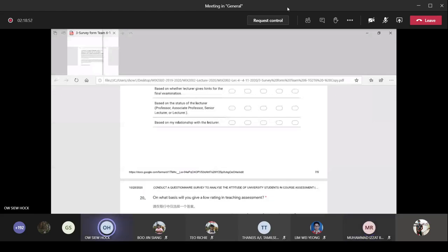So that means you've got a few pages. That's why I say don't break down too many levels, up to, let's say, 3 levels or maybe not more than 5 levels. So you can draw only the second level. Let's say one A4 paper is not enough. Maybe one of the sub levels can be drawn within that first sheet of A4 paper, then the second sheet will be the A, the B, the C. So maybe 4 or 5 pages of A4 turned into landscape will cover all the PBS or WBS. Is that clear now?